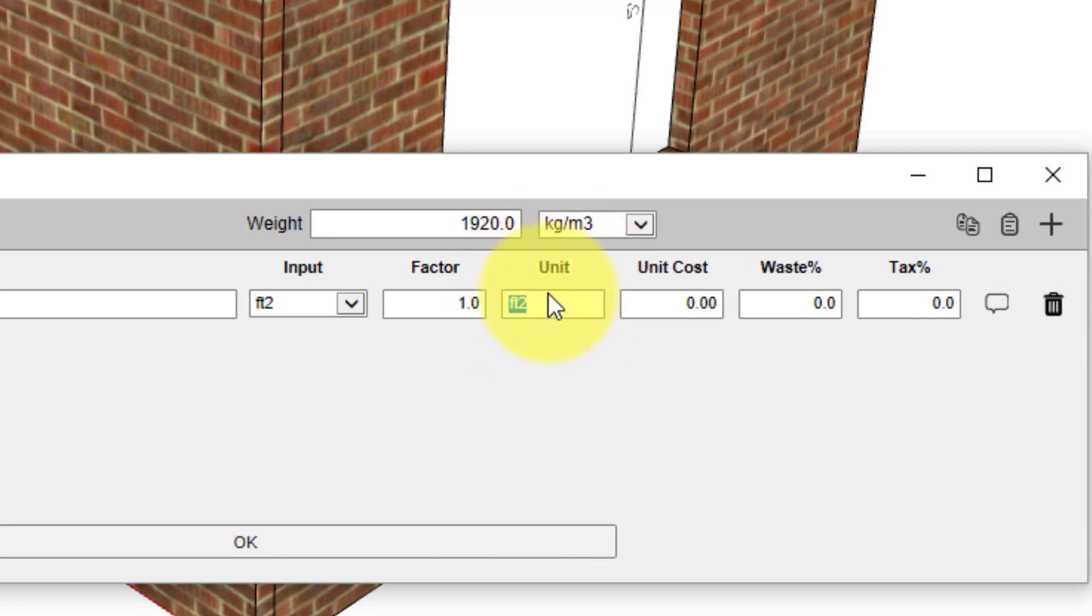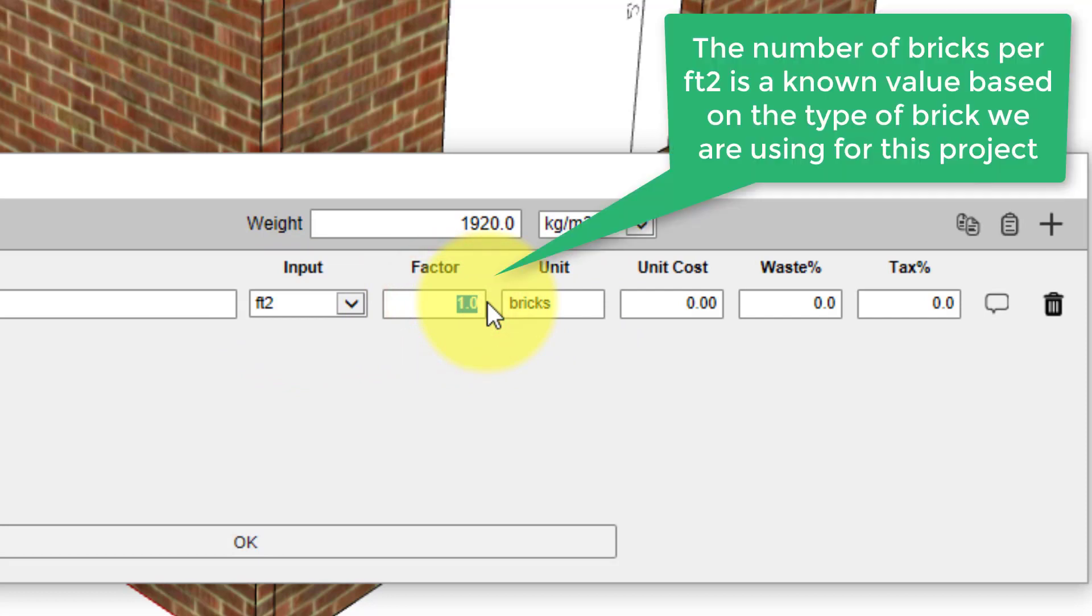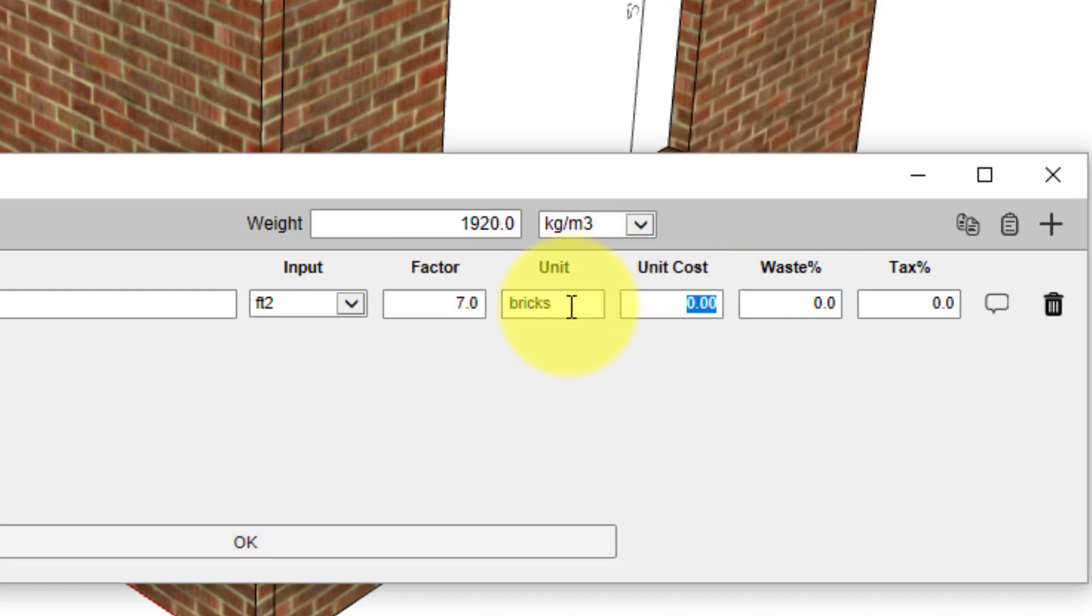This unit is the unit that will be reported in the cost estimate report, so we're going to change that to say bricks. Now we need to have a conversion factor to convert from square feet to number of bricks. In this case, there are seven bricks per square foot, so the multiplier is simply seven. The unit cost will refer to the unit we've specified, so we need the unit cost per brick. We're going to put 30 cents.